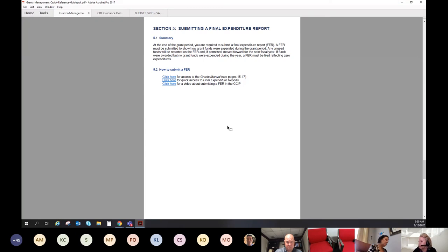Please mark your records for that, and we will keep in touch with you to let you know that it is due. This is the report you're going to use from the CCIP to summarize all your expenditures during the performance period to say, hey, we're done, we're closing out the grant. Here's our final expenditure report. It's also going to matter because of the way state accounting works. It's going to take about 7 to 10 days for a payment to process through the system.